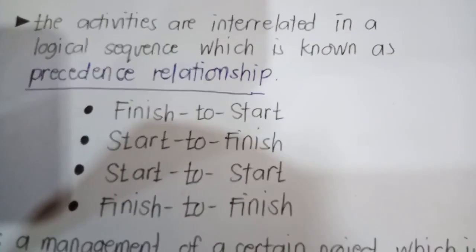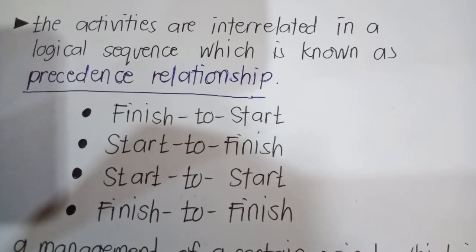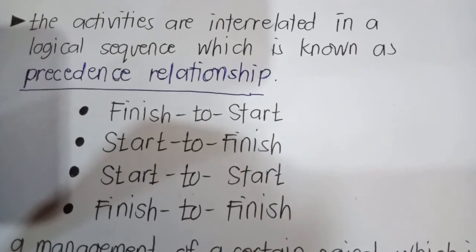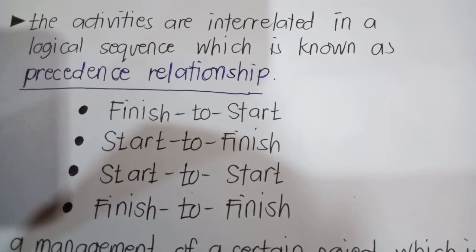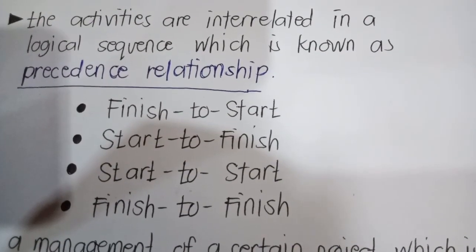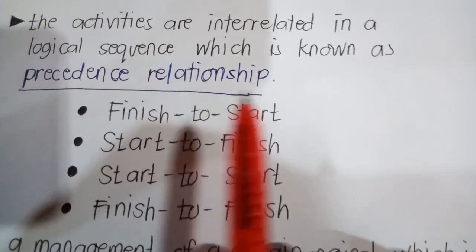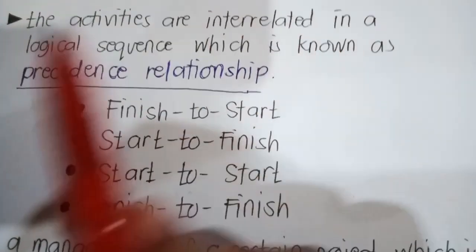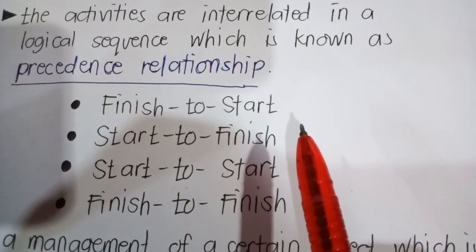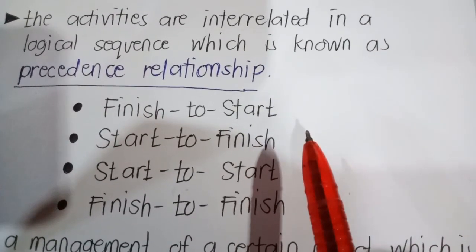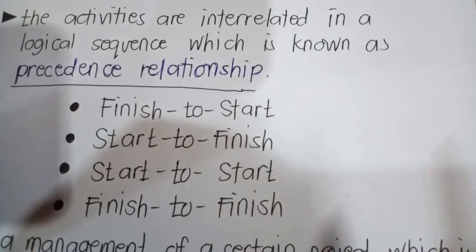For example, activity A is 'create the project charter,' and activity B is 'obtain the project charter approval from the project sponsor.' This finish-to-start relationship says that we must create the project charter first before we obtain project charter approval from the project sponsor.